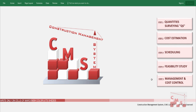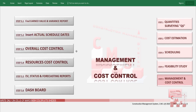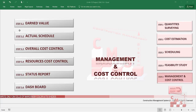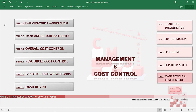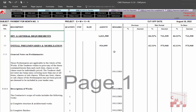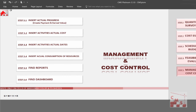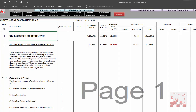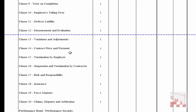CMS Platinum will help you manage your project during execution. After completing everything in the tender and pre-contracting stage, CMS will make full management for cost and resources. You will find the steps to follow to reach the final reports and recommendations. CMS will find the earned value according to actual progress on site, give a variance report comparing planned and actual progress, help make monthly payments according to actual progress, and create cost codes for each activity to record and assign all costs during execution.